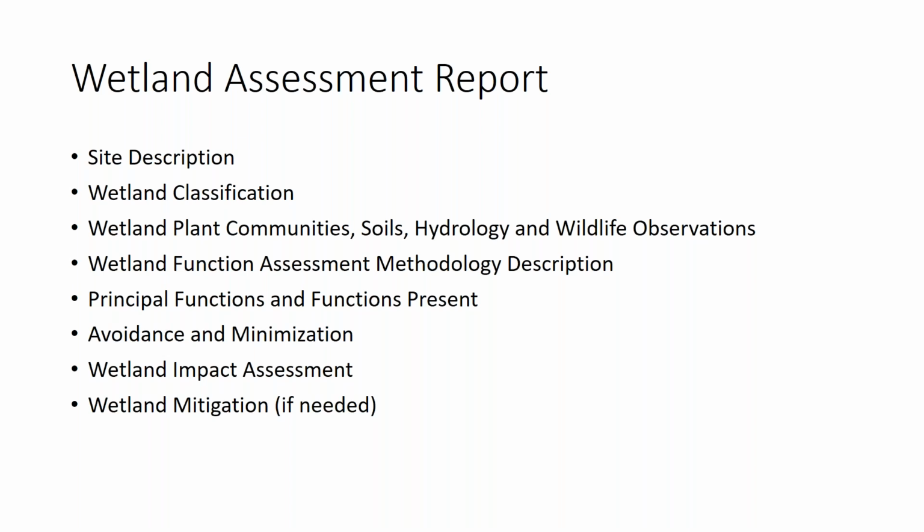However, I also, with every application, list every document included, so that you want to have the avoidance and minimization narrative form, because the intake people at DES don't know if you did avoidance and minimization unless you have the form. So some of these applications have 30 attachments. So for DES, there is a lot more work to answer all the questions and to provide a complete assessment. Next slide.